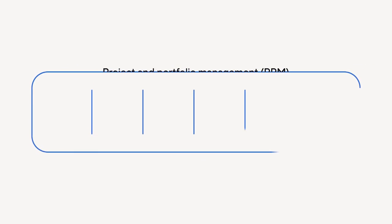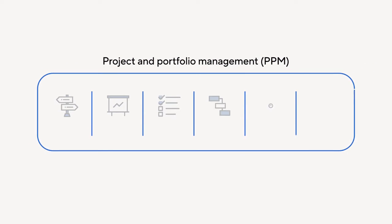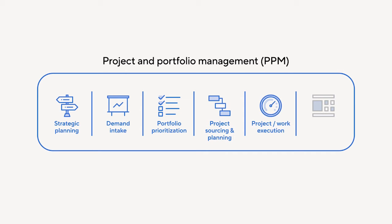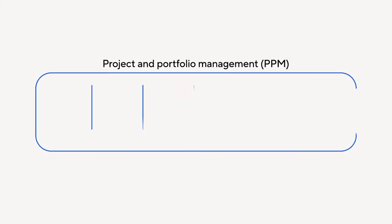Smartsheet breaks down PPM into six different jobs to be done: strategic planning, demand intake, portfolio prioritization, project sourcing and planning, project work execution, and portfolio reporting. Let's take a look at how you can use Smartsheet to manage each of these elements.